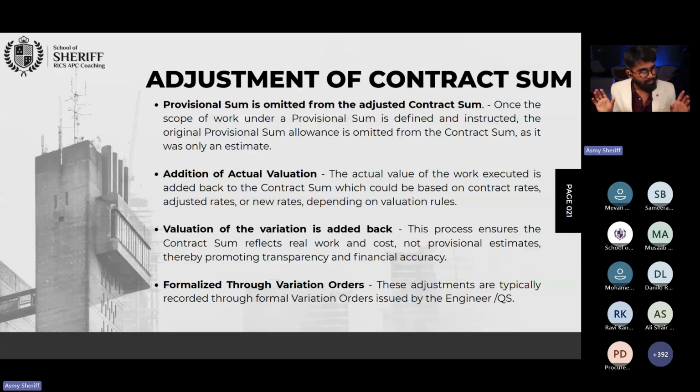Both will sign. If they sign, this document is a contractual document. That's enough for you to consider as a contract amount. You don't want to change the contract. So once you sign that, where you have very clear terms and conditions which tell, guys, we both are agreeing for this valuation, for this provisional sum, 3.8 million is our money.